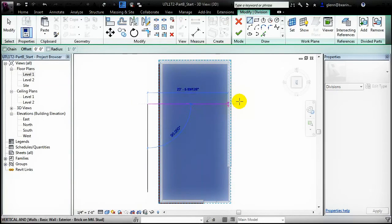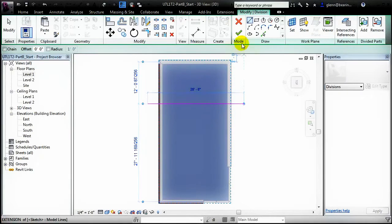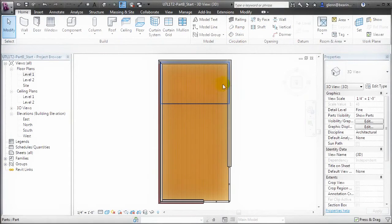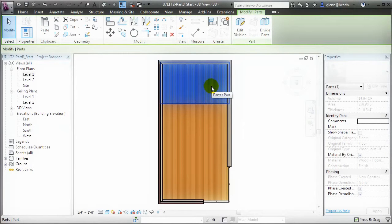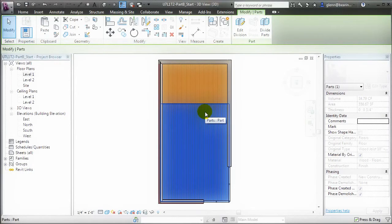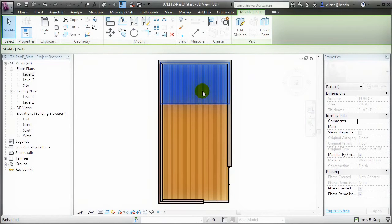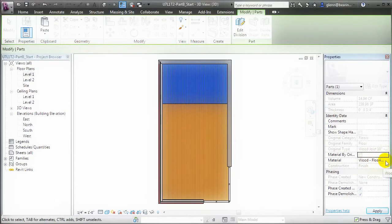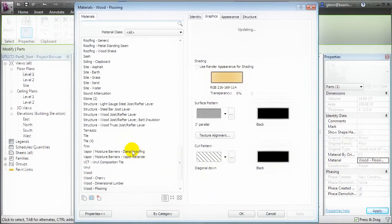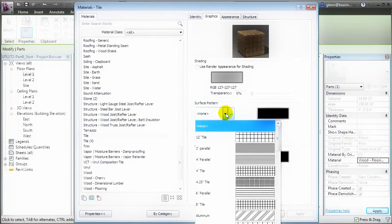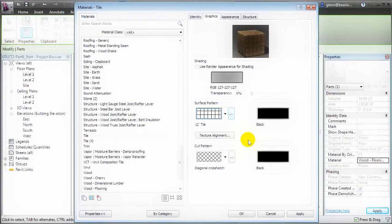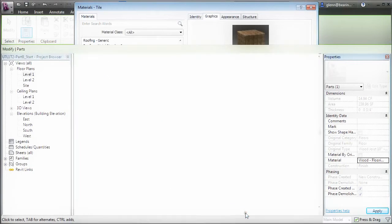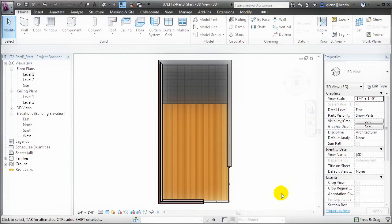For example, if we draw a line across the rear of the building and say OK, we'll have one part representing the finished floor in the back of the building and a separate part representing the finished floor at the front. In the back of the building, we can select that part, turn off the Material by Original setting, and then choose a different material for the floor in that area — maybe tile, with a surface pattern that will allow us to easily see the distinction. Click OK, and we now have tile in that back part of the building, and a part that accurately represents the area and amount of tile for the rear portion of the building.